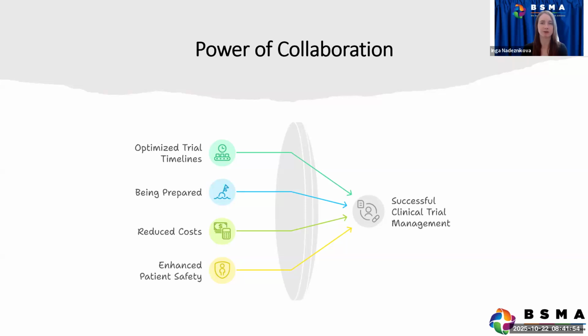We had that cross-functional team, and we created a process together, and we developed the training and the materials, and emphasized the importance, because it's also about educating, bringing those timelines for everyone to see how long the timeline actually is for sourcing the product and getting that first site activated. So making everyone aware how long it actually takes, and if action is not taken, we really say 8 to 9 months before the study starts is going to be really hard to ensure that the study starts on time. So we create that awareness of how important it is, if you want to start a trial on time, to have this earlier assessment.